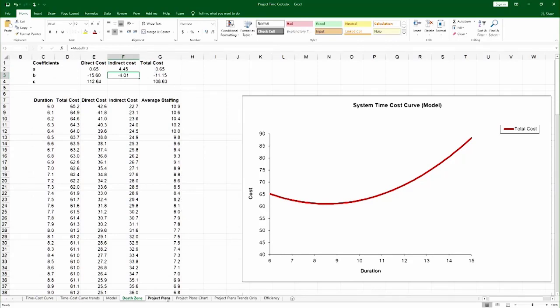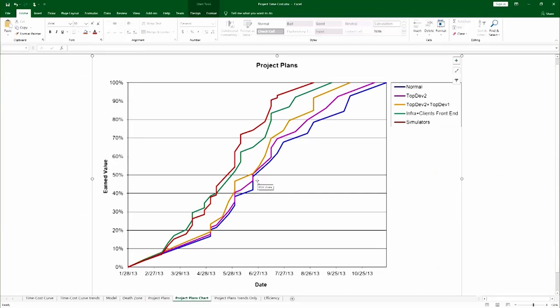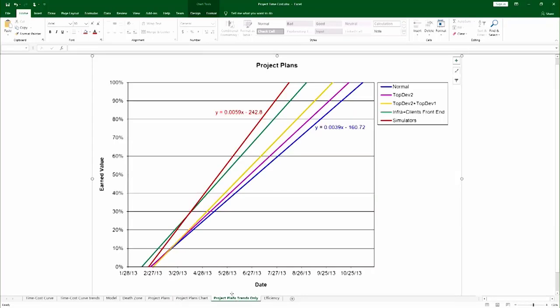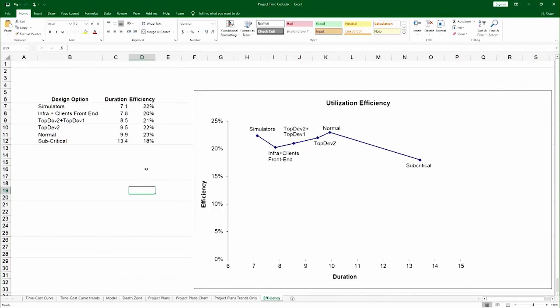You also have the project plans required to produce the throughput analysis. Here is the throughput analysis comparing the various shallow S-curves of the solutions, replacing the S-curve with the linear trend line and their equations. You can even do numerical throughput analysis. And finally, there is a plot of the efficiency of the various solutions. All of that is in the project time-cost Excel file.